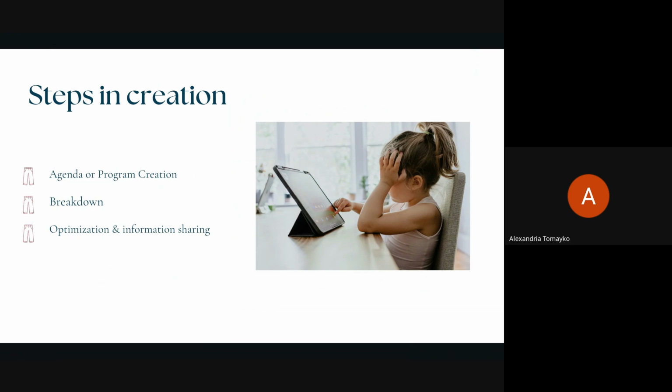Then, in creating your itinerary, you're going to take the agenda or program that you shared and break it down, step by step: what needs to happen so this can happen, so the next thing can happen, what the dependencies are, then optimization, and very key, information sharing, because we have to share the information with our team.